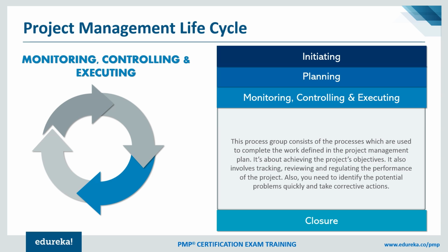And the deliverables we are producing are part of our definition as well, that the project is supposed to be delivering a unique product, service or result. So even verifying that deliverables are meeting customers' specifications and requirements, and giving them to the customer so that the customer accepts the deliverables, which we call the accepted deliverables, those activities are also done in monitoring and control.